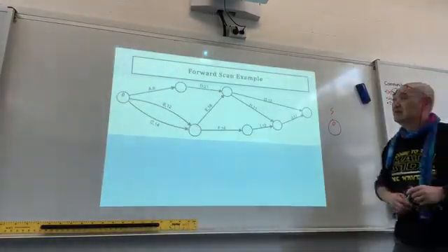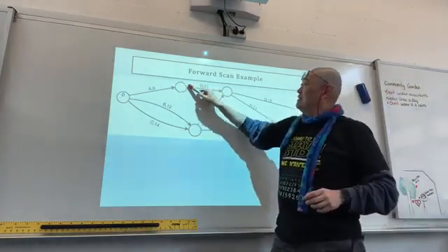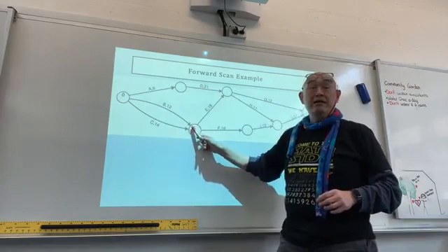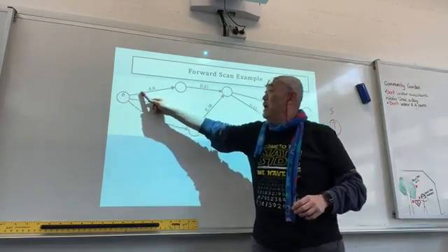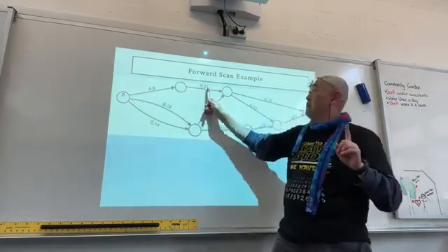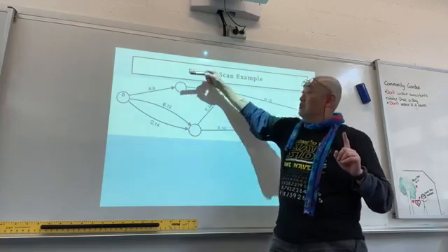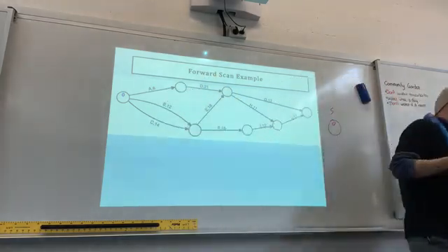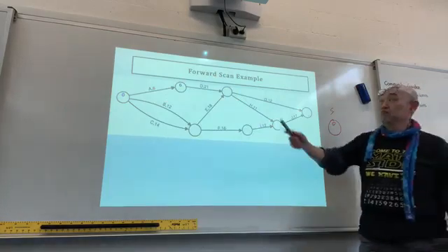You can see that at this vertex here, there is nothing else coming in, correct? There's only A going in. A has to finish before D can start, correct? So therefore, at this point, the maximum time is 6. Let's say 6 minutes.